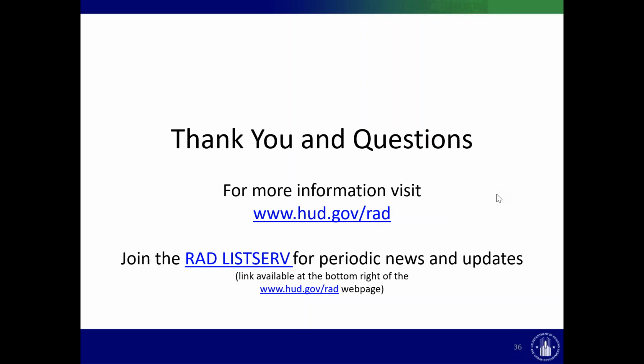There's a question about portfolio awards. Would HUD consider extension requests where it takes more than a year to close a phase of the conversion? So just to clarify, each individual CHAP will be assessing two things. One is the progress made by an individual CHAP award, an individual transaction, with an initial financing plan due date of 9 months or 270 days. And we fully expect that there are going to be reasonable justifications to extend those beyond 9 months, waiting for tax credits or arranging other due diligence.